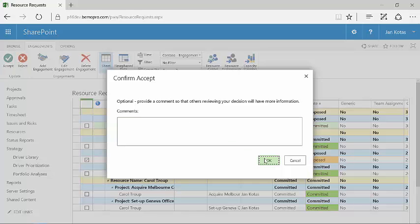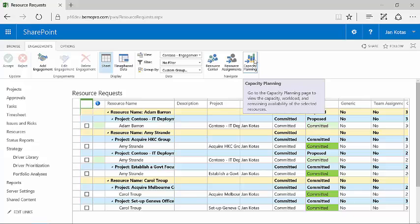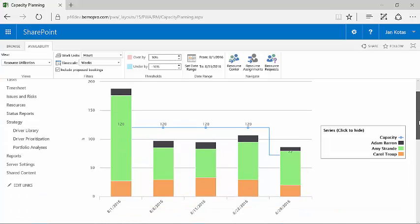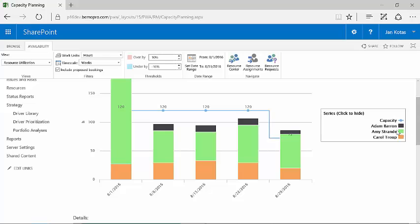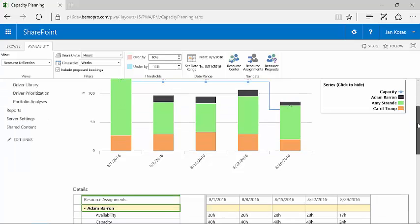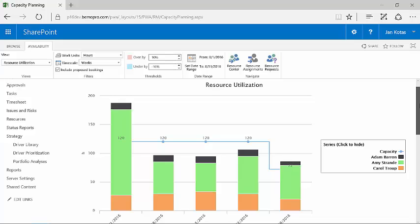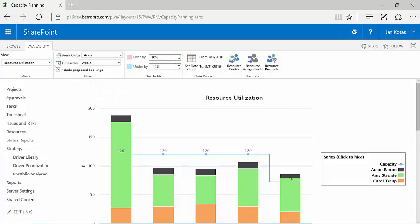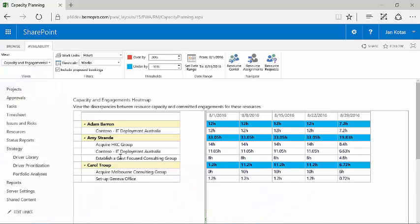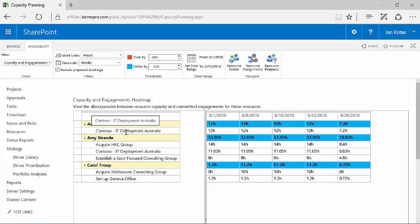And basically when I now go to the capacity planning and I do that, you will notice that it has changed. Because I have got Adam, I've got Amy and I've got Carol. So you'll notice that I don't have Carol on the particular schedule we were working on. I can actually focus on the resource plans by going up to again this very new, very powerful feature called Capacity Engagements and Heatmap. And therefore I can now see exactly what Adam is doing. I can see exactly what Amy is doing. And you'll notice that while Carol is on other resource plans, she is not on this Contoso IT deployment.